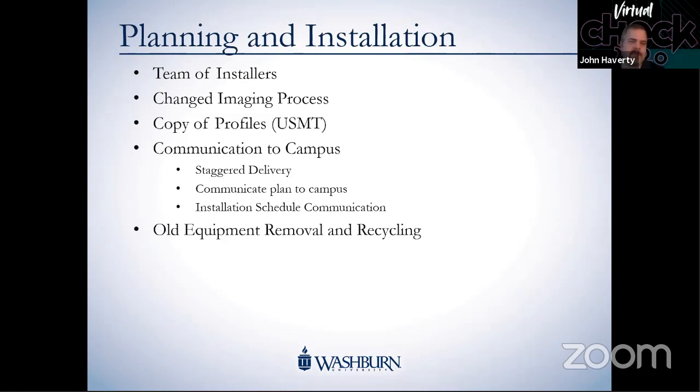The other piece the team of installers was handling was the old equipment, as I mentioned. So we go in, put a new computer in, and we have to take that old computer out. You have to find a spot to store it temporarily. We worked with our inventory control, but we didn't have room for it. As these systems started coming out, it was something we recognized, obviously, before we started this whole process. We were going to have to find a spot to keep all those old systems coming out. So luckily, our inventory control ended up getting two basically semis down on the southeast corner of campus.